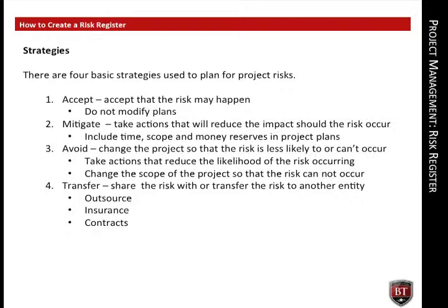4. Transfer the risk. Share the risk with another entity or transfer it completely. This can be done by outsourcing work, purchasing insurance, or contracting with another party to assume the risk. Credit default swaps began as a transfer of risk strategy. Take care with this strategy and recognize that it creates another set of project risks.